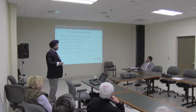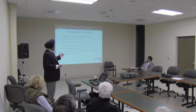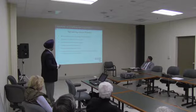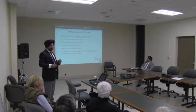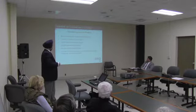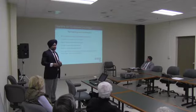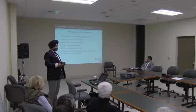So in phase two, we have remaining items. As you have seen, there is a lot of progress made in phase two. All the structures will be completed: the block set basin, ozone contactor, and wash water recovery. We have large diameter pipes that are being installed, a few left. The electrical equipment pad, the area 13 that we showed, is almost there. And we are not expecting any significant traffic increase in the next quarter. So the chart that I showed previously will remain about the same for the next quarter.